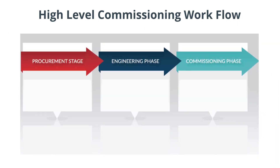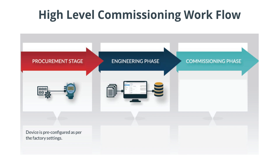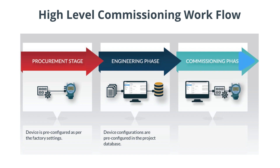During the procurement stage, devices are ordered with either factory default settings or pre-configured per a custom datasheet provided by the EPC. During the engineering stage, functional tasks of the device based on expected process conditions are finalized and stored in an overall project dataset. Later during the commissioning phase, this dataset will be downloaded to the device. It's during these final two stages where FDI drives consistency.